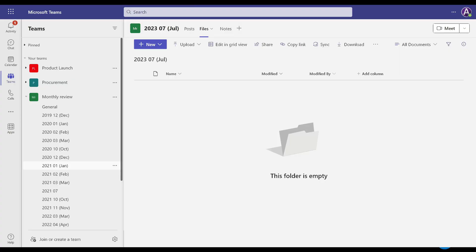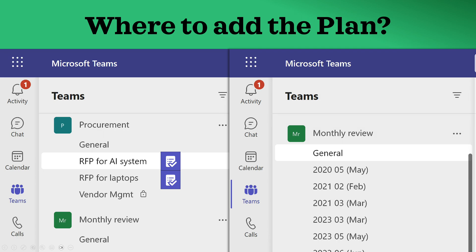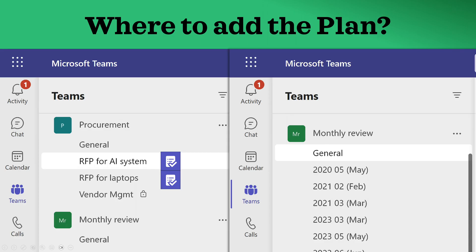Now look at another scenario. I have created a team for a recurring meeting called Monthly Review. I want to keep track of each meeting, so I have a separate channel for each month. Where should I add the task list? In this case, I'm not going to add a separate task list for each month's meeting. Why? Because tasks I promised in January, I want to follow up in March and check if they're done. And this month's meeting, I want to add to the ongoing list of tasks. So in such cases, add one Planner shared task list in the General channel and keep adding to it — follow-up becomes easier.